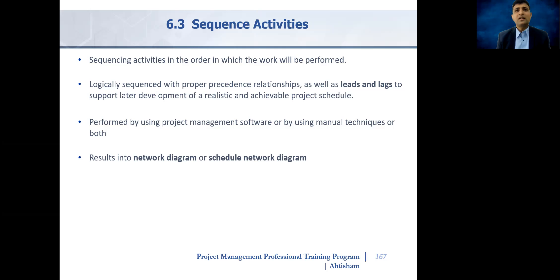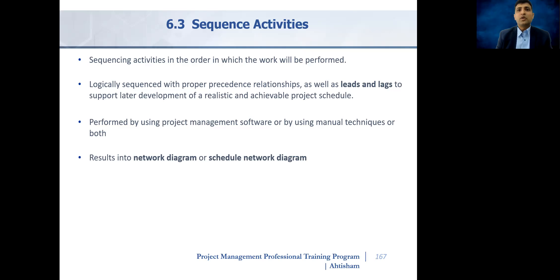Each activity in the activity list should have at least one predecessor and one successor, except the first and the last activity.